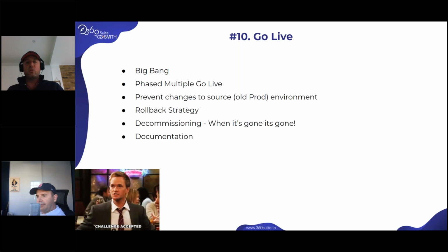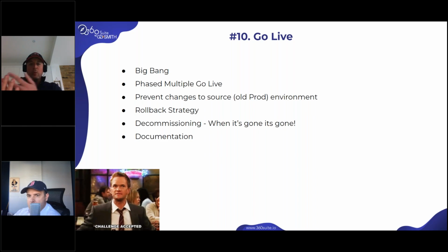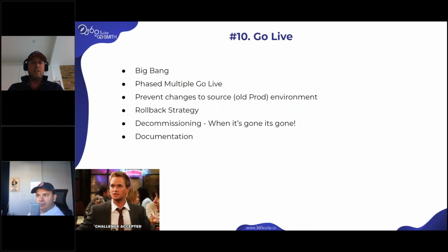Well, things change in your source environment during that time. Instances, people created stuff. You need to bring the Delta. There's unfortunately only 3 ways, let's say, to do this one. You know what has changed, and you manually go and select them and you bring them. Okay, the problem you have is, what if you change or you fix things at the destination, and you know, the bit of nightmare there.